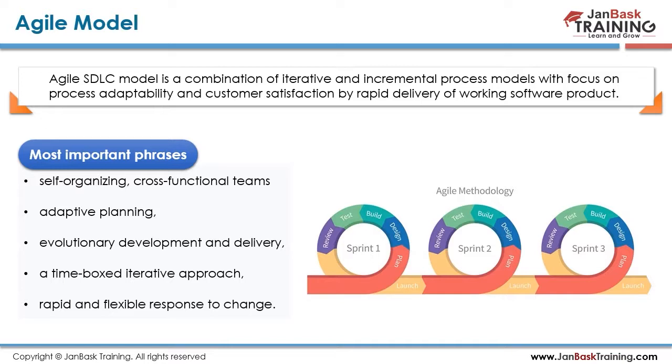Remember in the waterfall, if I find out some identification as the last step, then I again need to go back to step 1, check with the client, get it done, and follow the same 6 steps here. Whereas in Agile, the client is involved with us at step 1 itself. So even if you make any changes in sprint 1, in sprint 2 you can get it done. Whereas in the waterfall, if you have made some mistake over here, by the end of the release you're going to get to know what mistake you have made, because clients are not involved early there.